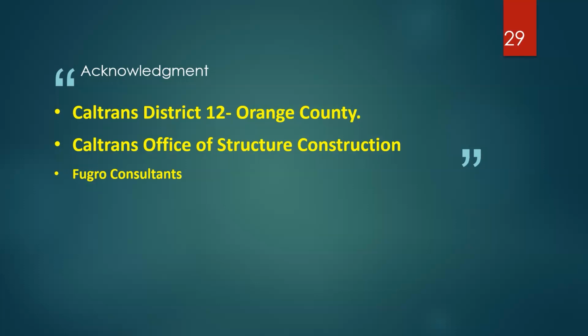For us, we could have introduced that into the TP, as I mentioned, just like we introduced CPT. But to do that, it would have required an extra cost to the project, which was hard to argue for, unfortunately, just because they would go back and say, well, your own guidelines don't require it. How come you're asking for that? So, because there's a cost element to that, we didn't go that route.